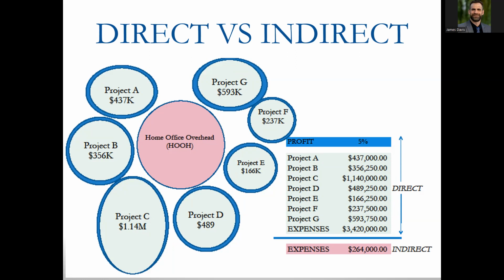So in a sense, and by classification, those are direct costs. I wouldn't have that trailer. I wouldn't have that manager if it was not for that project. However, I cannot figure out how to charge their hours to every single change order. Like how many doors I'm going to buy, how much time does the trailer have to do with a change order for providing new doors. So we have what we call indirect directs, and that really is confusing.